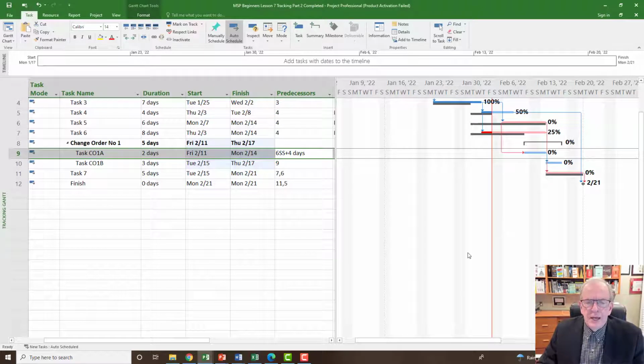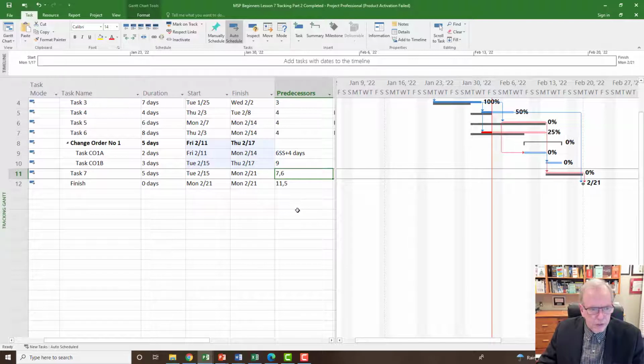Negative lags are somewhat discouraged in certain types of projects and in certain environments. So why don't we leave it at that then, seeing we put that in. But you could do a negative lag. There's no sort of negative lag police, unless, like I said, you're in heavy industrial or civil projects. And then your contract might discourage that.